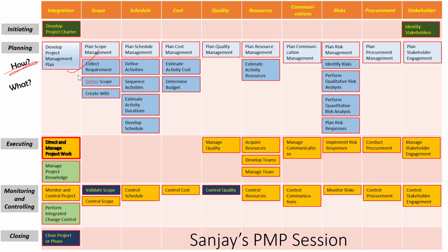Okay. Yes. In the plan scope management, you will not say which requirements are priority because you have not collected requirements yet, correct, Swati? But here you will say that in my project, after capturing all the requirements, I will mark each one of them as high, medium, or low. That strategy decision is part of the scope management plan. Correct? Yes. Then once requirements are done, you will segregate them into high, medium, and low. Are you getting this, friends?